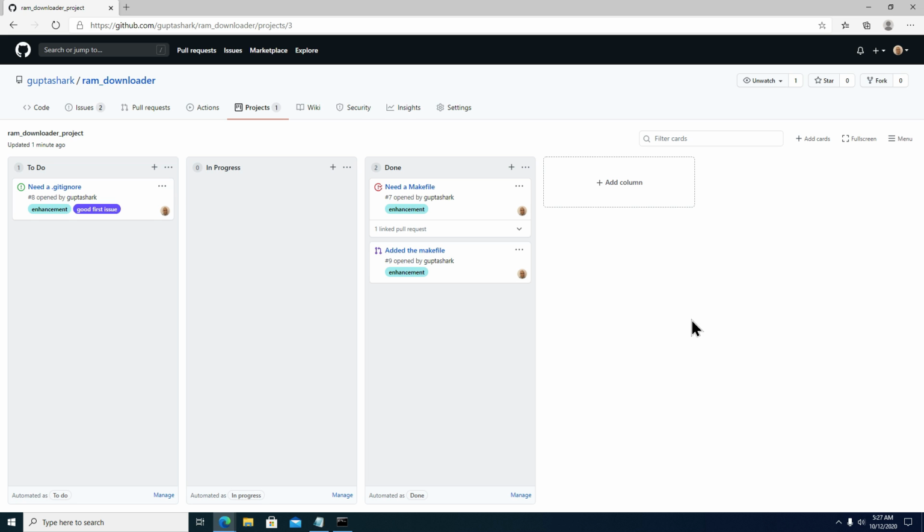And we've basically gone through a nice, short, simple example of how you can create issues and link them together with pull requests, and then have the cards automatically move across the page to track your progress when you close them. Close and merge and develop.